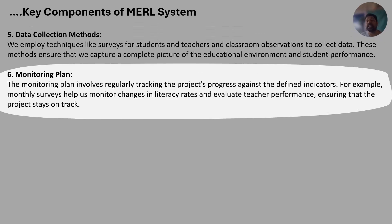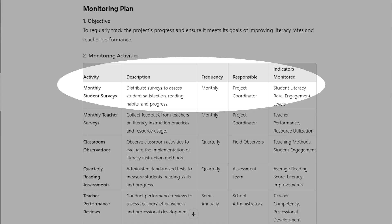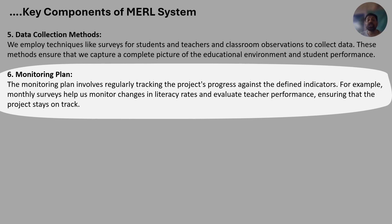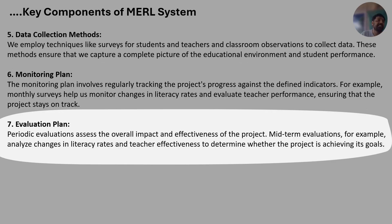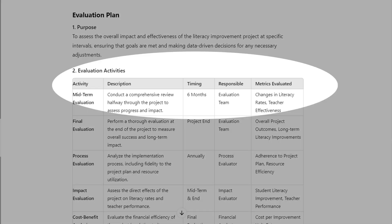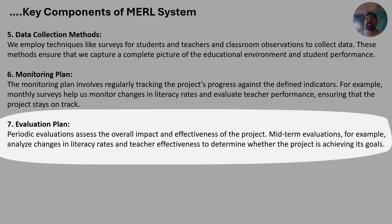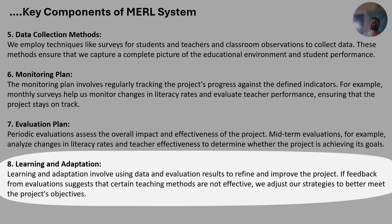The monitoring plan involves regularly tracking the project's progress against defined indicators. For example, monthly surveys help monitor changes in literacy rates and evaluate teacher performance to keep the project on track. The evaluation plan involves periodic evaluations assessing the overall impact and effectiveness of the project — for example, a midterm evaluation analyzes changes in literacy rates and teacher effectiveness to determine whether the project is achieving its goals.